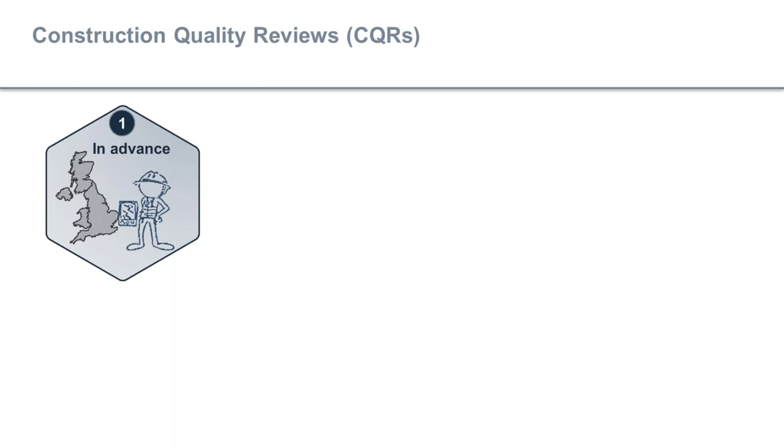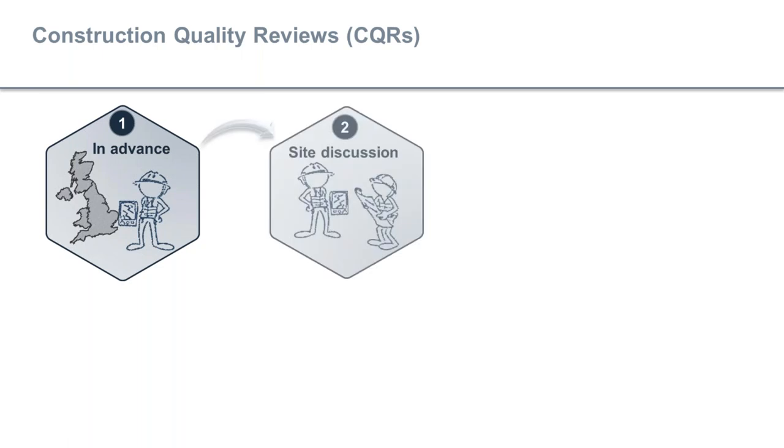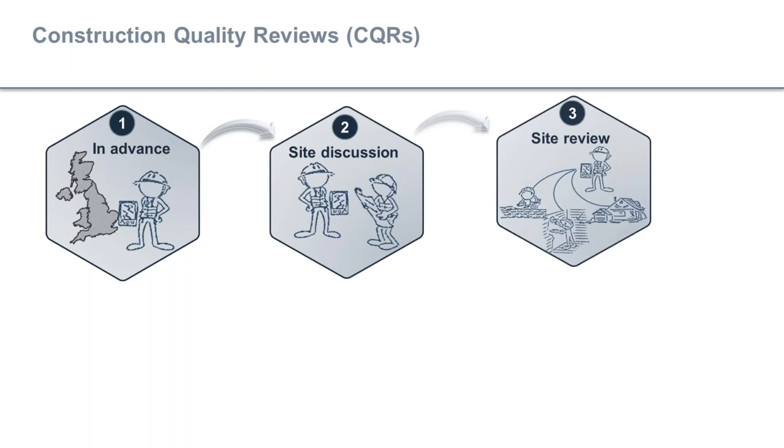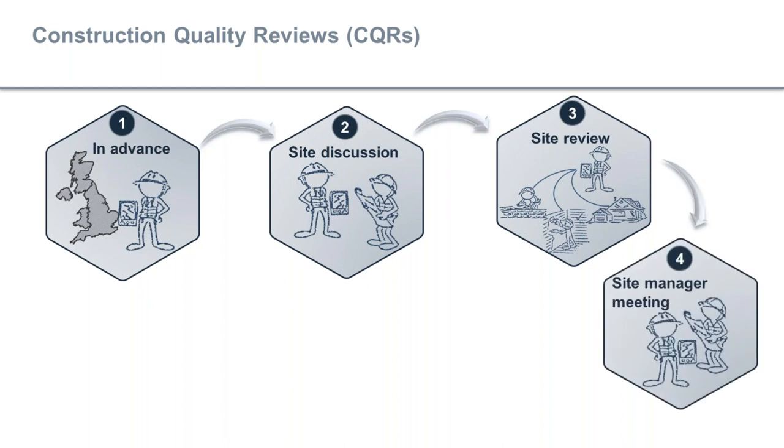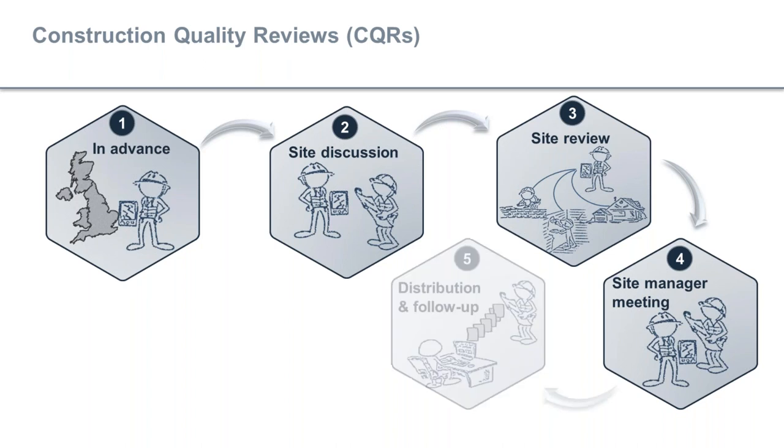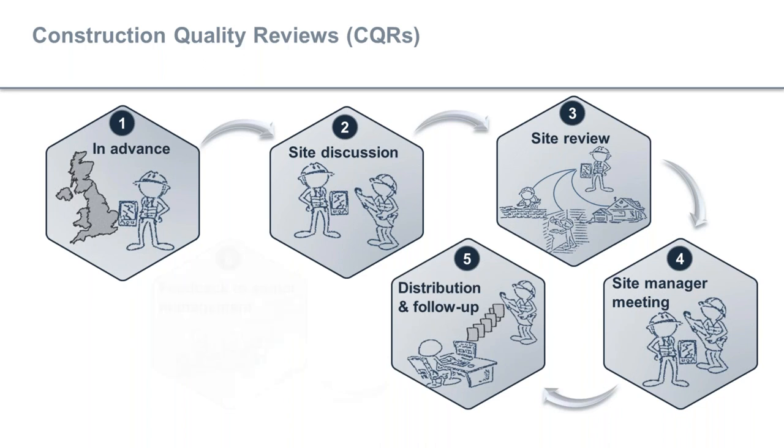So knowing that quality is not where we'd like it to be, we've developed a new initiative called Construction Quality Reviews. These are a detailed review of quality on-site undertaken by our inspection managers. They'll observe 38 build stages covering foundations to internal finishes and external work. What we look to do is understand first of all what went wrong, but also understand why it went wrong. Our inspection managers will look for a suitable site with the most build stages available for review, have a discussion with the site manager, and spend around six to eight hours on site looking at areas in detail.